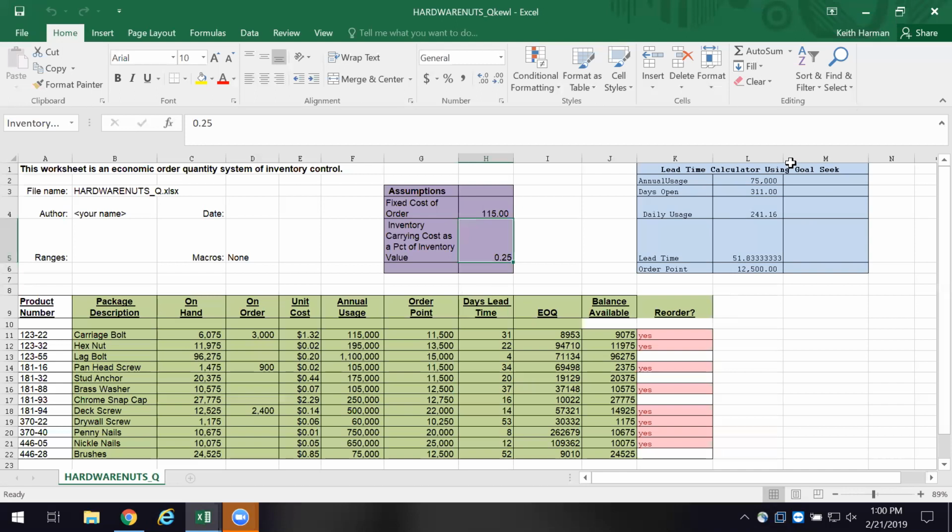Here's what it means then. Let's say today is what? What's the date today? 21st? Okay. If my supplier says I need 2 weeks of lead time, what they're telling me is if I order today, I'm going to get it in 2 weeks. If I have an order that I was supposed to fill for my customer within the next 9 days, I've got a problem. I'm going to lose my customer. So I'd better either have the inventory on hand to meet their needs, or I'd better be willing to pay my vendor an extra amount of money to get it to me fast.